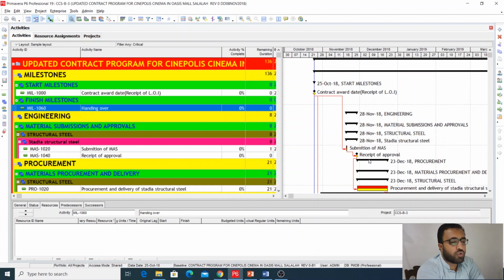I have worked in some 5-star hotel projects. In Oman, I have worked on the Crowne Plaza and some other projects, and on a Marriott in Saudi Arabia. In those projects, why is the kitchen critical? Because unless your kitchen is operational, you cannot open your project. If your whole hotel is completed but your kitchen is not operational, you cannot open your hotel. So all the ducting, the exhaust air ducts, the exhaust fans and the other MEP items related to your kitchen will be critical.